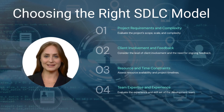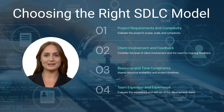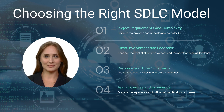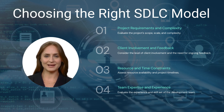Choosing the right SDLC model is a crucial decision that can significantly impact the success of a software project. Factors like project complexity, client needs, and team expertise play a significant role in this choice. Each SDLC model offers distinct advantages and drawbacks, from the structured waterfall model to the adaptable Agile approach. Here are key points to consider. Project Requirements and Complexity: Evaluate the project's scope, scale, and complexity. For well-defined projects with stable requirements, the waterfall model may be suitable. In contrast, Agile or iterative models are more appropriate for projects with evolving or unclear requirements.